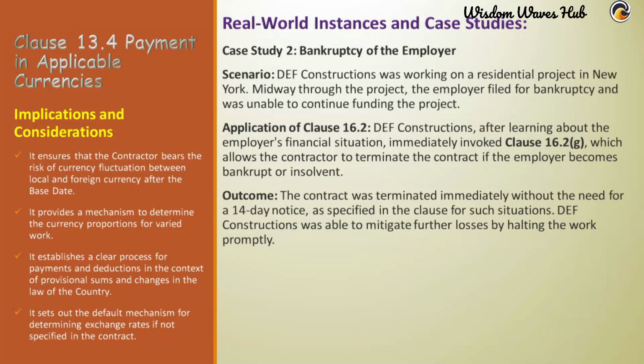Def Constructions, after learning about the employer's financial situation, immediately invoked Clause 16.2, which allows the contractor to terminate the contract if the employer becomes bankrupt or insolvent. Outcome: the contract was terminated immediately without the need for a 14-day notice, as specified in the clause for such situations. DEF Constructions was able to mitigate further losses by halting the work promptly.